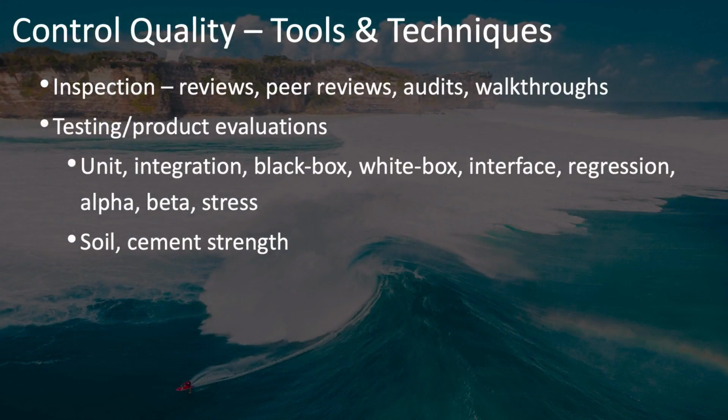Other tools and techniques include inspection, and this can take many different forms. Different sorts of reviews of your people's work, peer reviews in which team members review each other's work, structured independent audits, even walkthroughs of your products by sitting down with key stakeholders or customers and showing them how it works. You can also be doing all sorts of different kinds of testing or product evaluations.